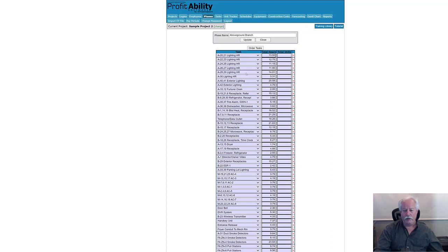And so in this particular project where we have these small tasks like this, obviously one guy could do 3 of these tasks in a day, right? So when you build your schedule, you kind of need to know that, so that it's going to count it as a day, even though it's only 3 hours. It's going to show a day on your Gantt chart. So you might want to stack 3 of these in a row, and they'll all complete in one day, right? Just a little 411 there.